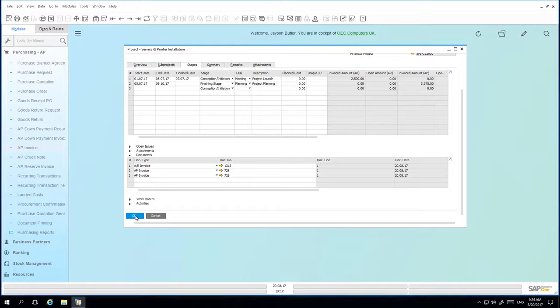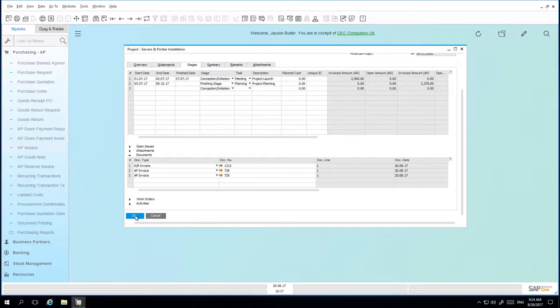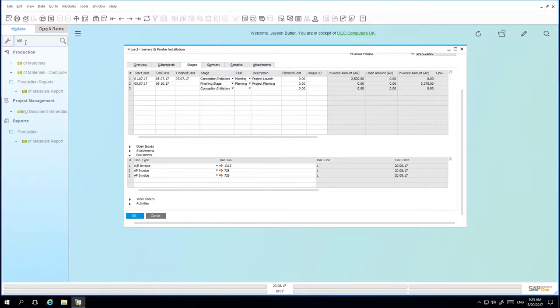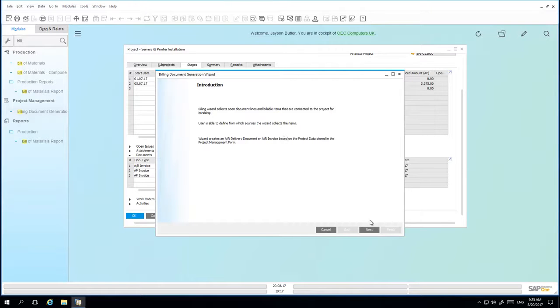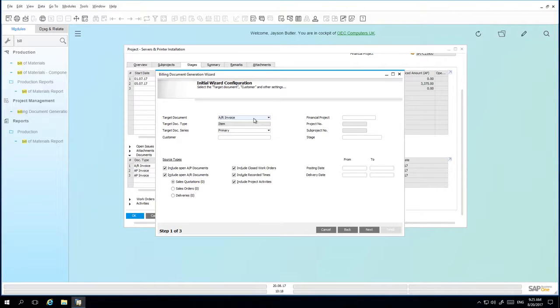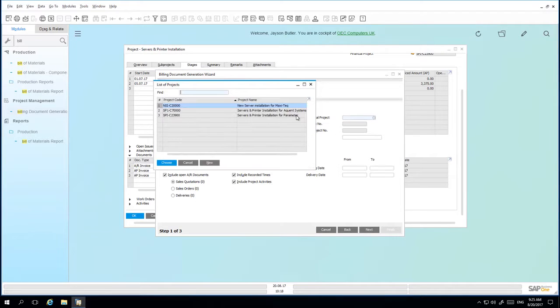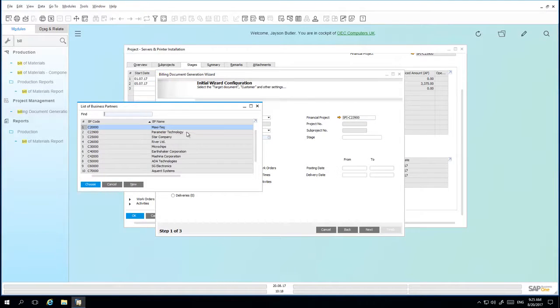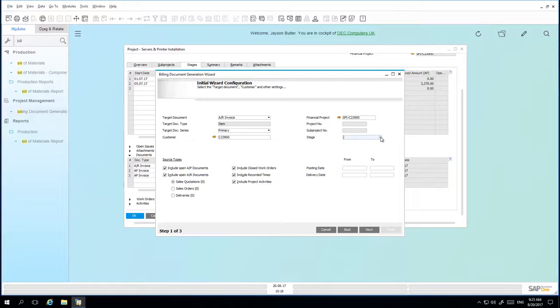It is now time to run the billing wizard, which will then collect all open document lines and billable items connected to the project for invoicing. We're going to, in the lookup menu, we're then going to open the billing document generation wizard. From here, we actually want to create an AR invoice for our customer. You have the option to create an AR invoice or a delivery document. We then need to select the financial project details and the customer that will be receiving invoicing. We then select the stage in which we would like the billing wizard to collect the relevant document lines from.